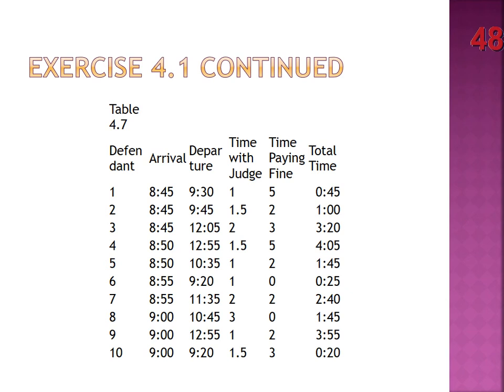And then when we calculate flow time efficiency, we're dividing the theoretical flow time by the actual flow time. So 3.95 divided by 120 minutes is 3.3%, right? So that means that of the 120 minutes, 97% of it is not value. I mean, they're just waiting, right? And so, again, if you were concerned about the customer, and again, this is about a power relationship, right? Who's got the power in that situation, right? But it's interesting to look at things from that perspective.